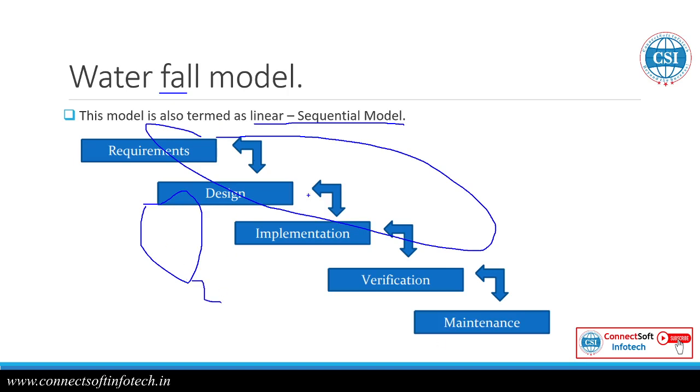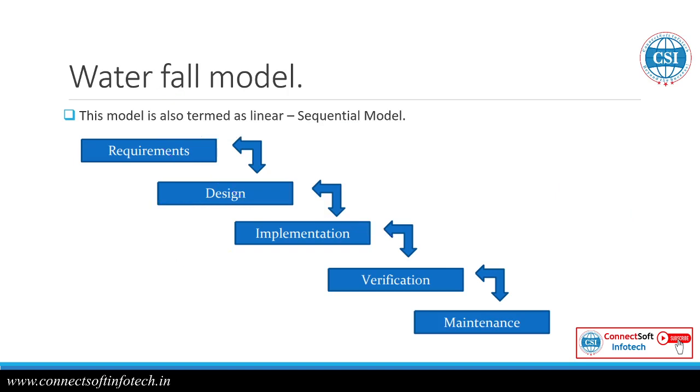Okay, so that follows all the stages and gets the working build. In the incremental model, in the first cycle you will get the working software, and then we can add some requirements and get the software again. Again we can add requirements, and it undergoes all these phases.